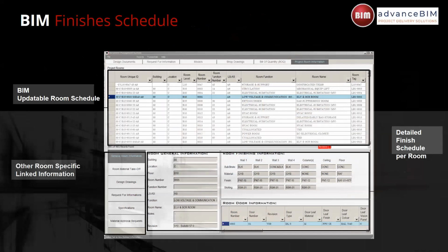This is a system that we have developed from the BIM models to show for each and every component of the construction what is required to deliver that component. And you make sure that your team goes to this area and ensures that all the components are delivered, quality controlled, and you have a certificate that this part is approved for payment or for quality.